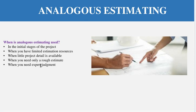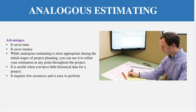It normally happens that the customer is asking for a solution and you are just giving them a rough estimate so they can get an idea of how much cost and time is required. This type of estimation also requires expert judgment — for example, a project manager who has already implemented e-commerce solutions in two or three past projects has the expert knowledge to judge that this type of project should be completed in approximately four to five months.